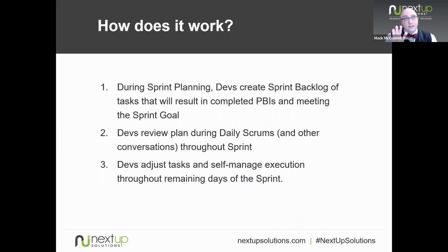The counterpoint, the only kind of thing I would do is if we're in the middle of the sprint and we realize that one of our estimates is way wrong, there's really not much of a point in wasting time to re-estimate it now. But maybe during that sprint's retrospective, we should talk about how were we really wrong, to see if there's something we could learn and apply to other backlog items that we haven't done yet. That's pretty much the only thing I would do.